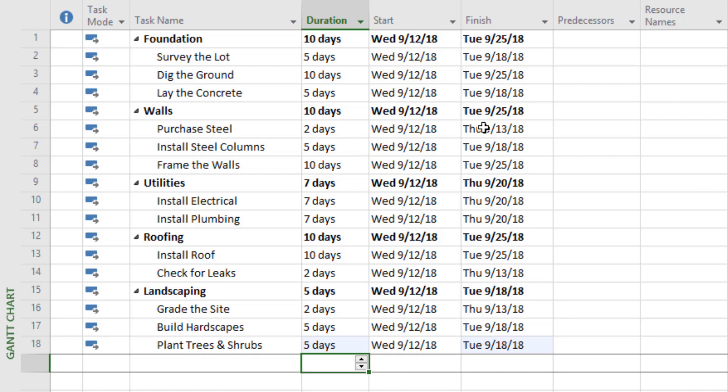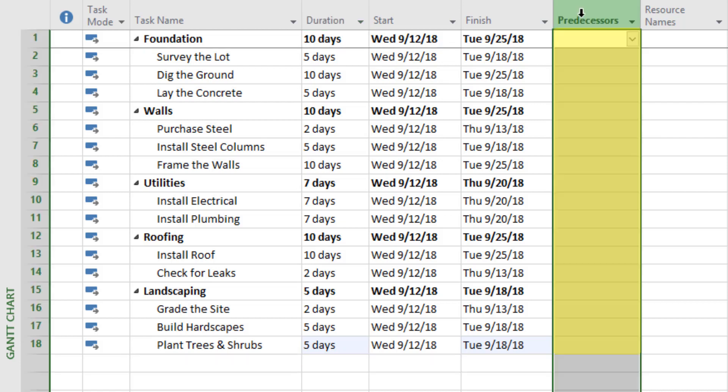Now that we've defined all our project activities and given them durations, we need to tell Microsoft Project the right order of events — what's the sequence of these activities. We need to add predecessors: activities that must come before something else. An example in the real world is that you've got to write a document before you make edits to it — writing would be a predecessor. Just like with durations, we only set predecessors for the lowest-level activities, not the category rows.